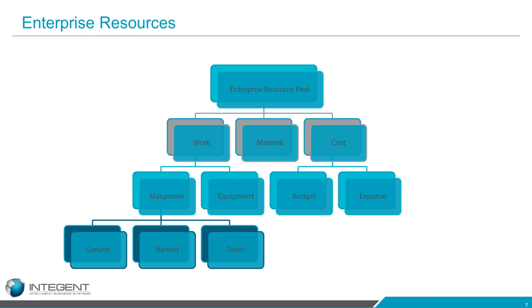All right. Cost resources, if you can think in terms of invoices, these are resources that maybe if I was traveling to your organization or your place of business to deliver a training session for your folks, maybe my travel or my lodging expenses, that would be an example of a cost resource.